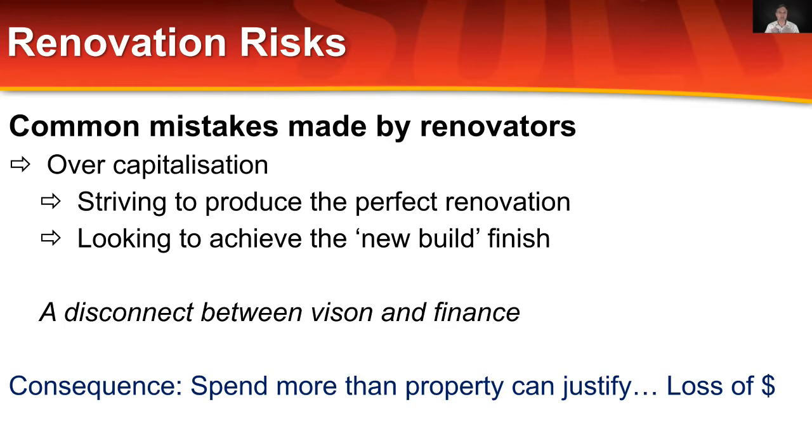So typically what I've seen is that if you buy something or live in something that's worth about $300,000, again, arbitrarily created here as an example, it's $300,000 when you start. You spend $100,000, you get it valued at the back end through a real estate agent getting his opinion, and they say it's worth $380,000. You've overcapitalised by $20,000. My encouragement is don't worry about that. If you've got a 10 or 15 year lifestyle enjoyment out of this renovation, that $20,000 will be